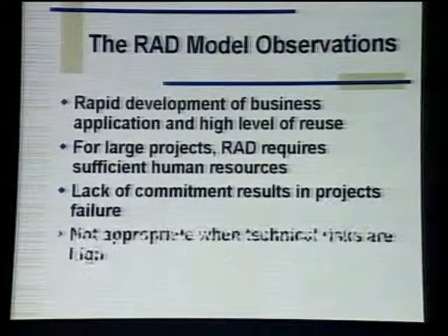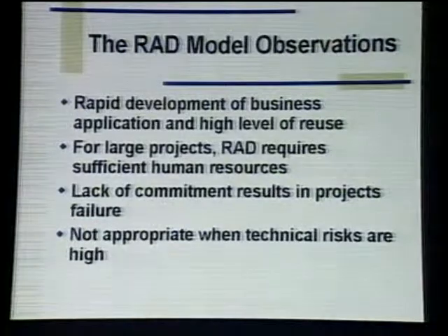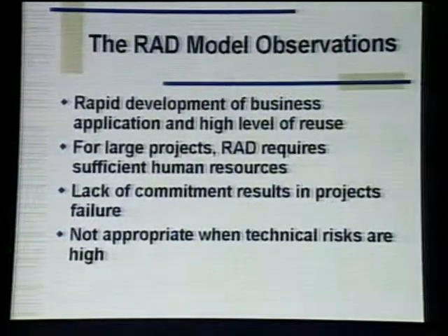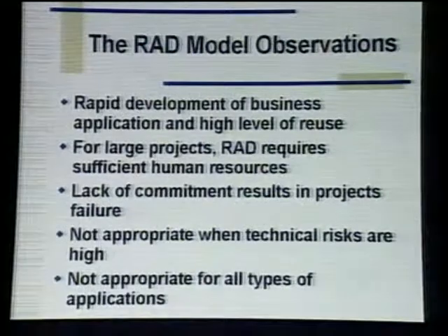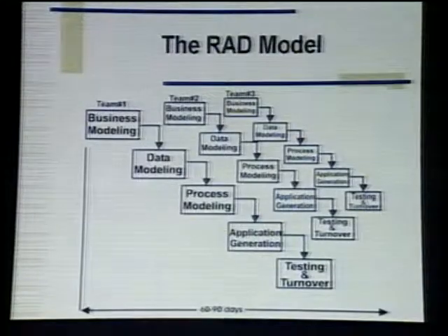Another observation about the RAD model is that it is not appropriate when technical risks are high. And another one is that the RAD model is not appropriate for all types of application. That's very evident from the diagram we showed you. The RAD model has been developed basically for the development of business application. Therefore, if you want to develop other kinds of application, the RAD model might not be a good choice.